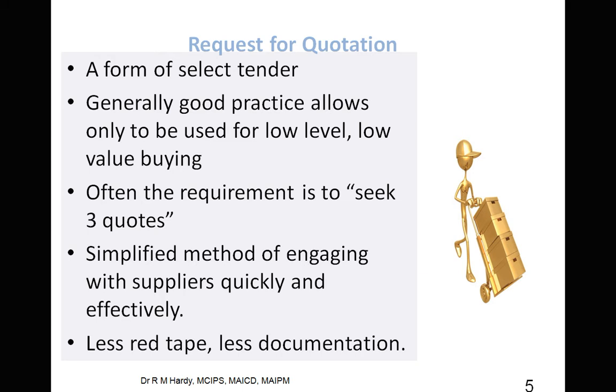Now, as I've said, one of the problems of tenders is that they are very formal things and you have no flexibility. And quite often when you're dealing in hot markets, quote unquote, where everybody is really busy and it's actually quite difficult to get a price from builders because everybody has got too much work on, what you might do is a request for quotation.